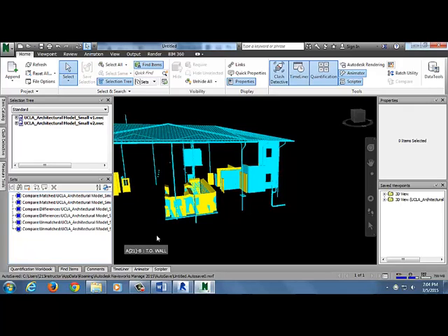So, I think you guys kind of got the hang of that. So, if, for instance, you had a larger, more complex model with a ton of changes, which I had recently on a job, I tried to do this and it was just like everything's red and everything's blue, this is not even helpful. Sometimes you can drill down just to a subset in the selection tree and compare those, if that makes sense. So instead of doing the entire model to the entire model, I could come in and do just floors to floors, something to that effect, right? So let's go ahead and do that.